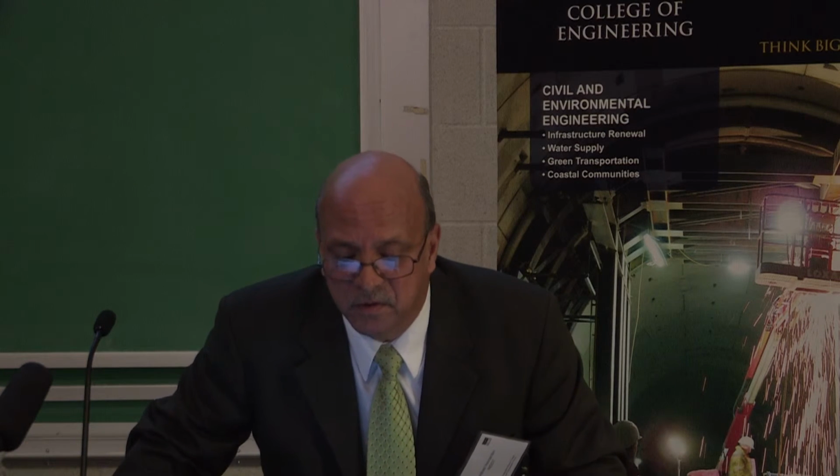Lessons learned. Well, quality control is and always should be the responsibility of the contractor. The contractors are responsible for their own products. And really, they're the ones in more control to make the improvements. What's key is a good quality control plan, but again, it's also a good understanding of it, a good implementation of it, and by all means, an enforcement of it. The minute you start slacking off on it, it's just like everything else. It doesn't work.